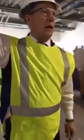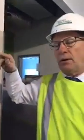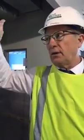So as you can see, and I'll point out to you this morning, each one of the classrooms already has a checklist next to it. So that's an indication that they're ready to come in and do a punch list or a checkoff list on all the areas and all the products that are installed above the ceiling. And once that's done, then they will move forward with the installation of the rest of the tile.